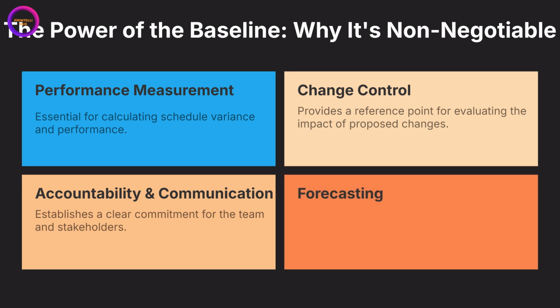And finally, the baseline is crucial for forecasting. By comparing your actual performance against the baseline, you can make realistic predictions about the future. It forms the basis for answering critical questions like, based on our current pace, when will we actually finish? Or what is the new estimated completion date? This forward-looking analysis is impossible without a stable starting point.